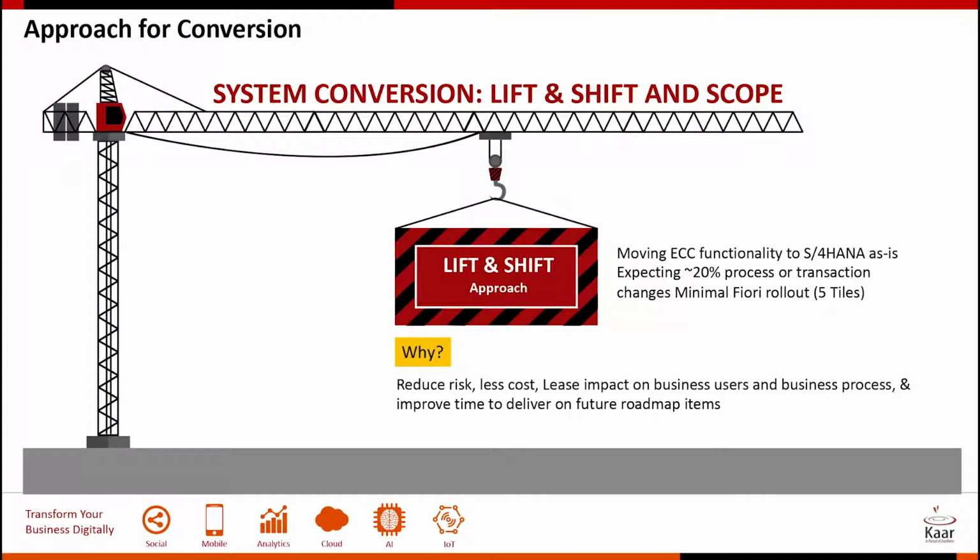So what is the approach for conversion that we take? We primarily take the lift and shift, meaning we take the ECC system as is and move it to S4. We only make changes where it is absolutely necessary, and if something has gone obsolete. Otherwise, we suggest this approach because it's reduced risk, less cost, and it gives you the least impact on business users. We don't go about Fioriizing all the available Fiori transactions, because it is not required, and it is not practical also. You want to keep this project simple.